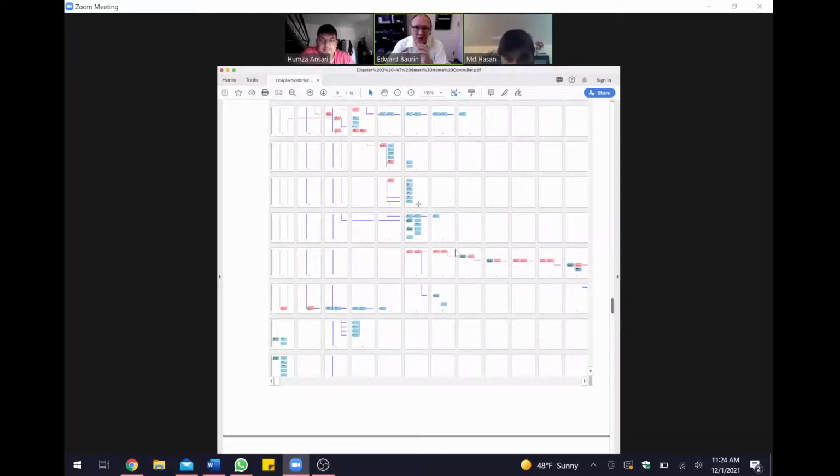Got it. And you have a lot of dead ends. Why do you create them? What is their purpose? Basically, it should start from one, then multiply, continue from there, and then come together into one point again. Oh, that's what you mean. Okay, we got it. We will try to fix that part.